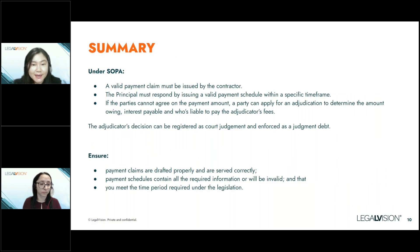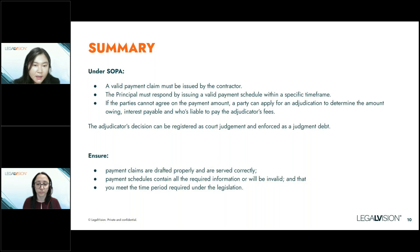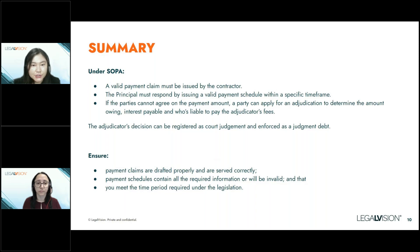To recap: the SOPA legislation provides an efficient and cost-effective framework to help building contractors and subcontractors recover payments. It protects them by giving them the right to make regular payment claims and imposing strict deadlines for principals and head contractors to respond. It also prohibits head contractors from making release of retention payments conditional upon something unrelated to the subcontractor's performance. Under SOPA, a valid payment claim must be issued by the contractor or subcontractor, the principal or head contractor must respond with a valid payment schedule within a specific timeframe, and if the parties can't agree on the payment amount, an adjudication application can be made. The adjudicator will determine the amount owing, interest payable, and who is liable for the adjudicator's fees.